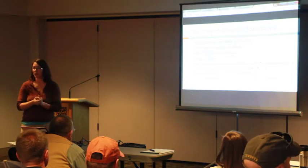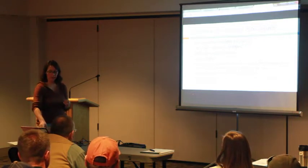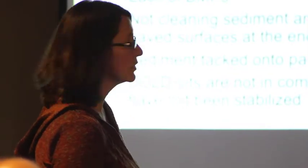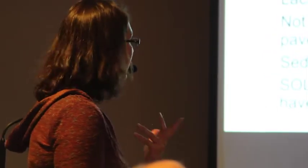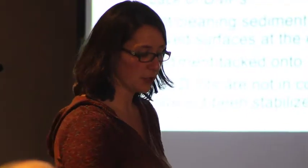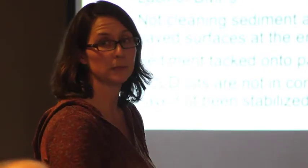You don't have any BMPs at all, or they're missing for something that's a big deal. I'm going to talk about dirt ramps in just a minute. This is a huge problem where I am. Sediment tracked onto paved surfaces must be cleaned up within 24 hours. And your sold lots are not in compliance with your SWIP, or they have not been stabilized. It's that common plan of development thing Barb was talking about. If you don't get it transferred over to them, they don't get that large construction permit, they're still in your SWIP, and you're still responsible for those sold lots.